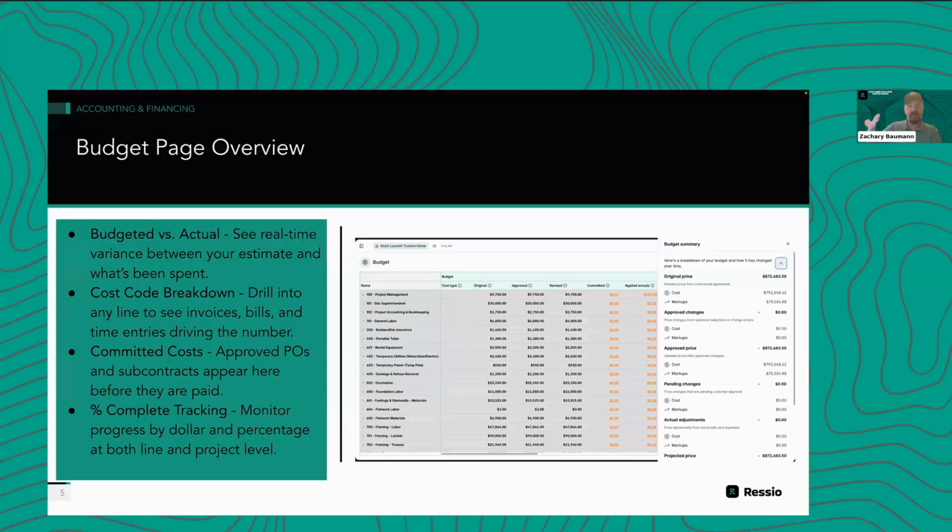And Melissa alluded to the last group of five here, your actuals. So your actuals are your real expenses on the project. Those actuals might come from purchase orders because you can create bills right from your purchase orders and tie them together. They might come from the things that you don't forecast, like what I like to call standalone bills. Maybe I go to Home Depot and pick up some materials. It's a receipt on the job site expense or things like that.